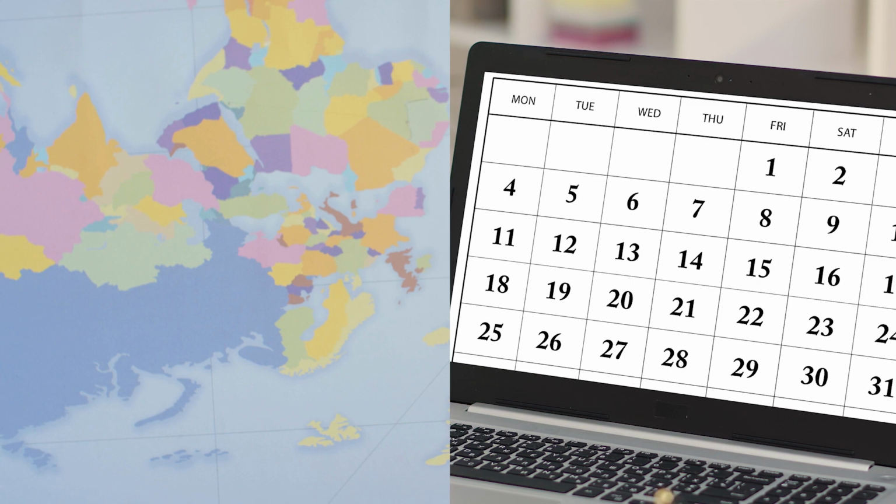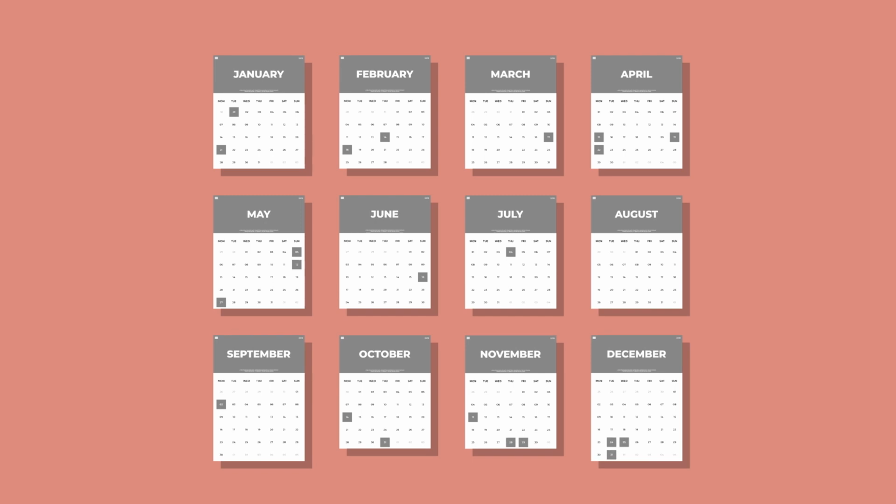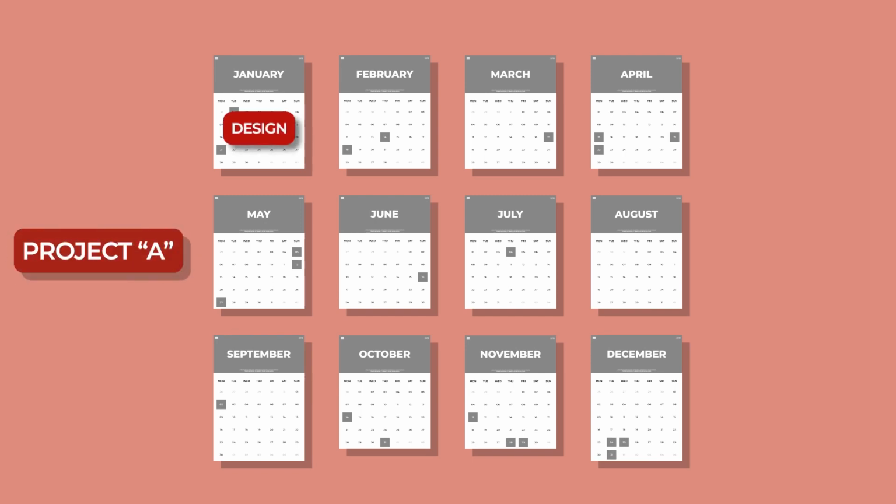The first thing is our Maplendar. Our Maplendar is a map and a calendar at the same time. Some people call it a Gantt chart, but that's not fun. So a Maplendar is basically mapping all of the projects that you have on a calendar, all on the same calendar, all at the same time. So here's what I mean. If you have a calendar that looks like January, February, March, and so on the side you'll have project A, and then in January that will be in design phase, and in February that will be in drawings phase, and then in March that will be in installation phase, and so on.